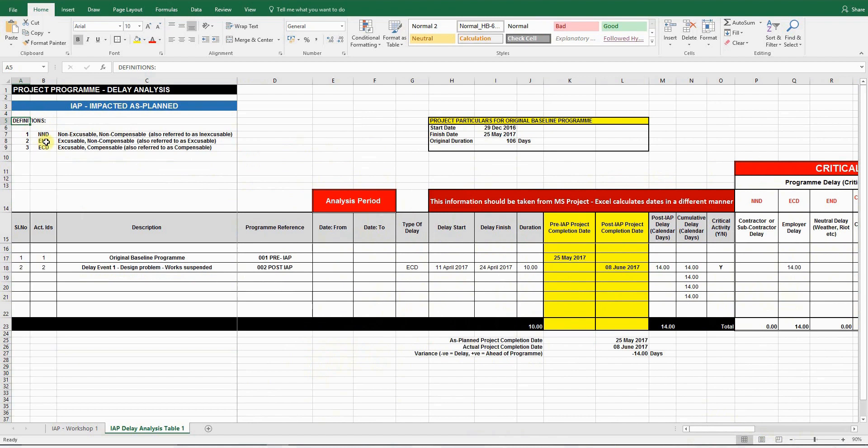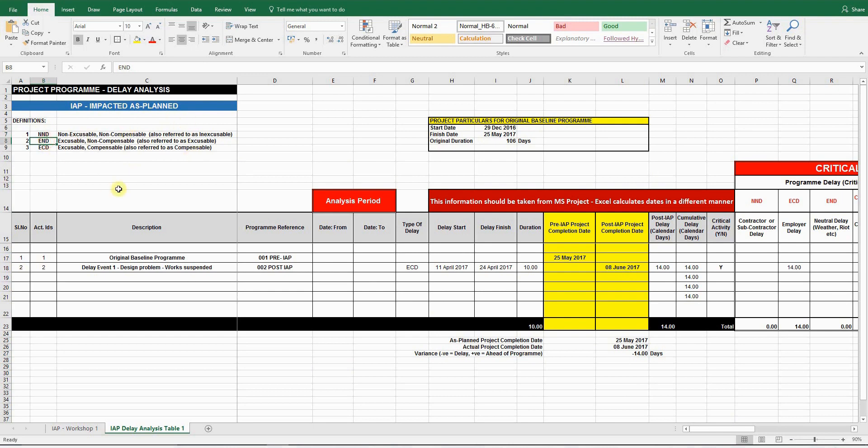Let's look at a few definitions. NND stands for non-excusable, non-compensable delay. It's also referred to as an inexcusable delay. This is a delay caused by the contractor. The next type of delay is an END delay, which is excusable, non-compensable. Also referred to as an excusable delay.